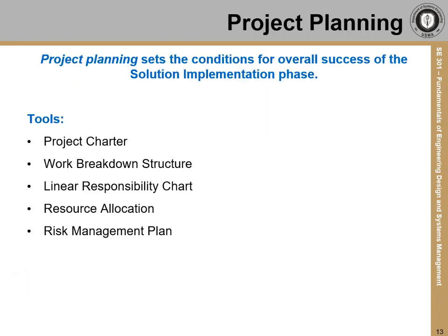With that understanding of ethical expectations of project managers, we turn to the work of project managers and the task of project planning. Good project planning sets the conditions for the overall success of the solution implementation phase. Here are 5 project management tools which have proven to contribute to successful projects. The project charter is a document issued by the project initiator or sponsor that formally authorizes the existence of the project and gives the project manager the authority to apply organizational resources to project activities.